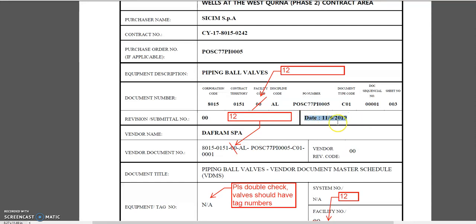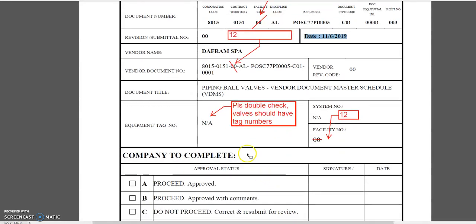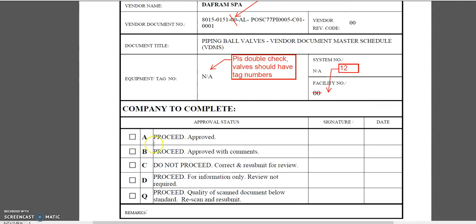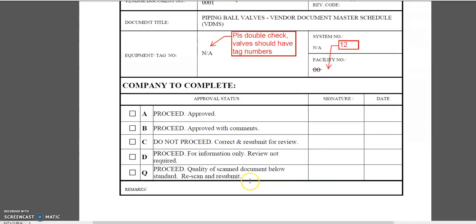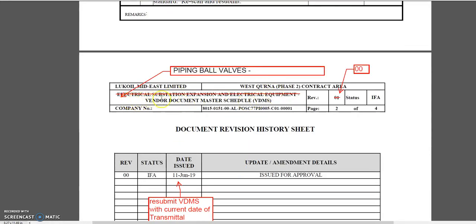When they revise, they have to change this date to the current date. We know that the facility code is 00, so it should be 12 — this will be 12. Now for valves, there's always a tag number; they have to double-check. Valves should have tag numbers, so we will approve this later on. What is wrong here? 'Electrical substation' — they just put it wrong; it should be 'piping ball valves.'